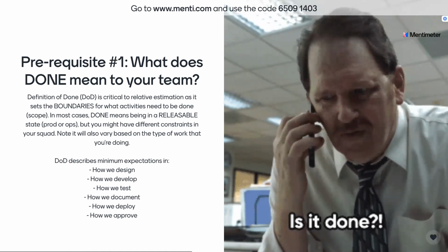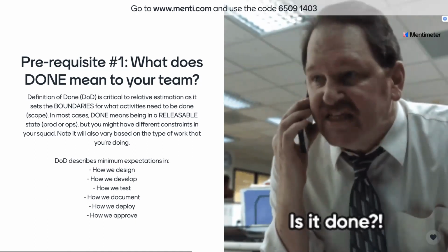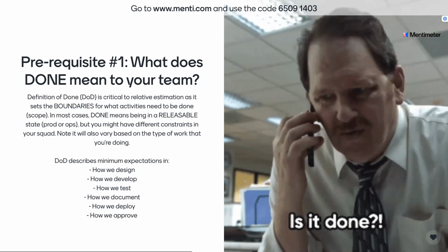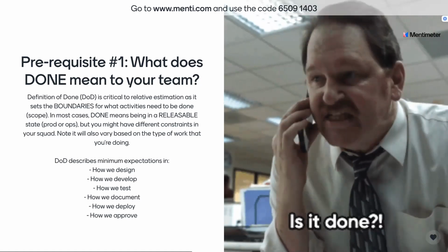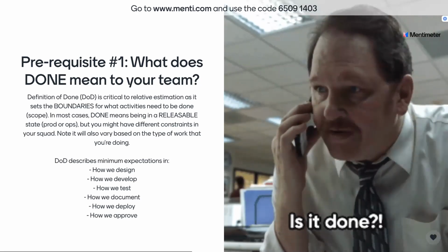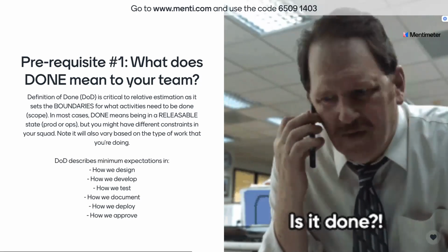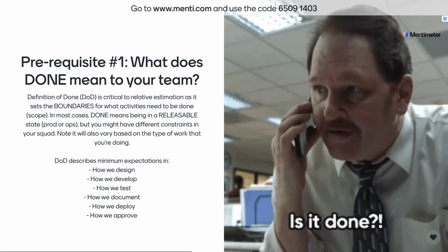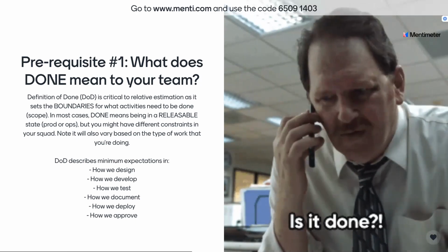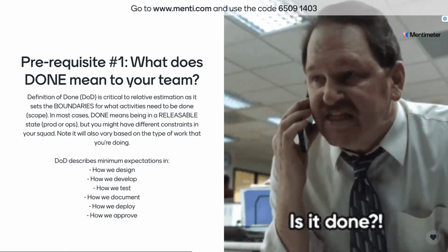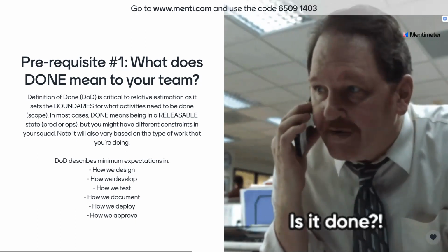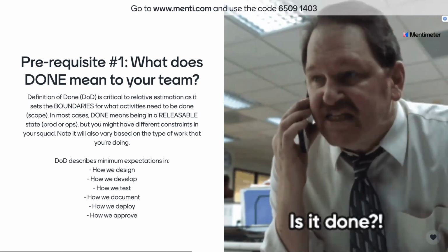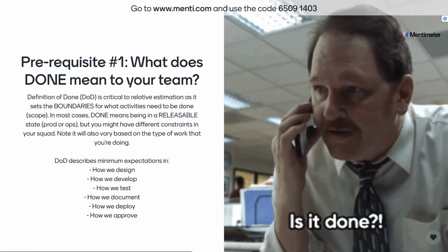And this infers what subtasks you might have to do throughout the sprint, and other help that you might need from others. Without this understanding of how far we're going to take this thing, it makes it very hard to quantify size, or effort, or risk, or complexity. So you probably work with user stories and tasks, and there's probably different types of them as well, because you guys look after a broad range of different product or service offerings. So the goal is to sit down as a team, in a quiet environment, and understand what our definition of done is. And it is a template, something for you to follow and apply to each user story or task or bug or whatever else you have to do.